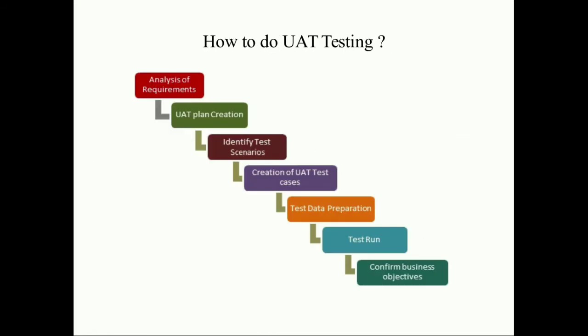And now today we will see how we can conduct the user acceptance testing, that is, how to do UAT. We have different kinds of steps to conduct the UAT. UAT, basically user acceptance testing, is done by the intended users of the system or software. This type of software testing usually happens at the client location, which is known as beta testing. Once the entry criteria for the UAT are satisfied, which we already discussed, the following are the tasks to be performed by the testers.